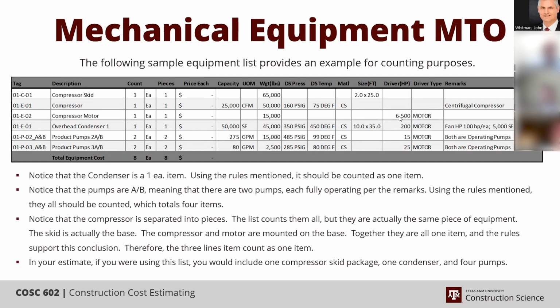However, you need to go back and check the purchase order, and whoever's doing the estimating should ask procurement for it. Say, can I see your purchase order? I want to make sure this is all coming pre-assembled, because if it's not, all of a sudden the 1,500 hours doesn't apply anymore. You have to start adding everything that's coming piecemeal into it. A lot of people will just start throwing hours at it and say, I'm done. Well, wait a minute. Did you double check?